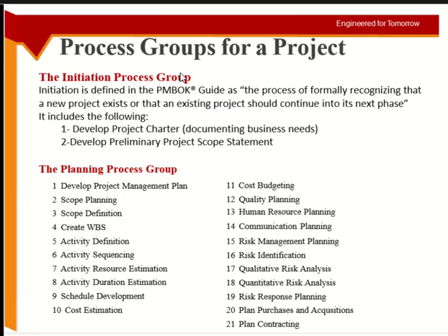In the WBS, you will have different activities. You have their sequencing, which will happen after what. We will discuss this when we deal with time management. What resources we need for each activity, how much duration each activity needs. If I add the durations of all the activities, it gives me the total schedule of the project. If I add all the costs and resources, this gives me the total cost of the project.